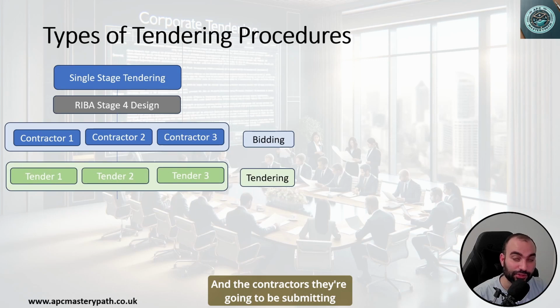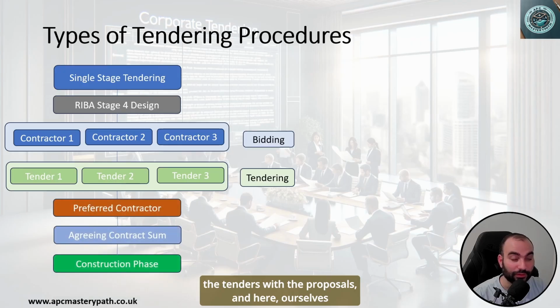And the contractors, they're going to be submitting the tenders with the proposals, and here ourselves as quantity surveyors and cost consultants, we're going to be undertaking the analysis and comparison between the different tender submissions, and that's going to allow us to draft a tender report which details the analysis undertaken in addition to the recommendations for the preferred contractor.